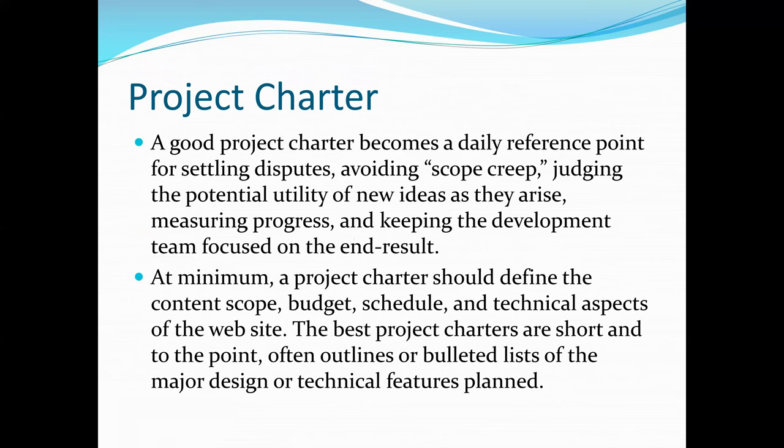The project charter document may consist of different sections. According to the Project Management Book of Knowledge guide, to create a useful, well-documented project charter, we should include elements such as the purpose or justification for the project, measurable project objectives, a high-level list of requirements, a high-level description of the project, and a high-level list of risks.